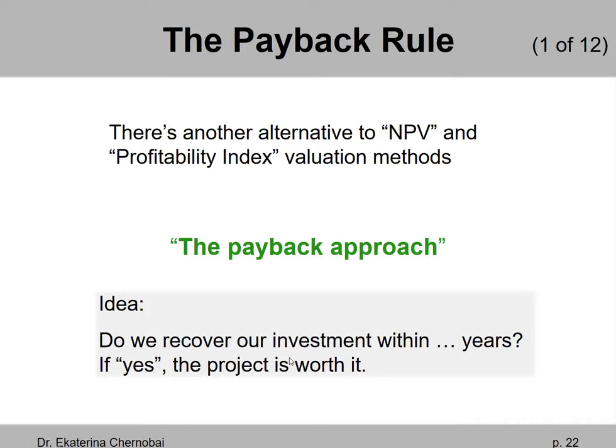The payback rule or the payback approach. How does this approach work? So this is another alternative to the net present value and the profitability index valuation methods. The idea is, do we recover our investment within so and so years? If the answer to this question is yes, then the project is worth it.